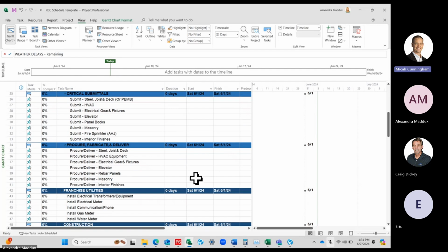That would be the measuring point. If the subcontracts are set up based on duration, that's what you would compare their durations to. And for the owner, that's what you would compare to for, okay, is this critical? Is this becoming critical? And what's your finish date that you have to meet overall? Your finish date can change if you get a change order, but that would just be your initial perfect world plan where nothing's delayed, everything's on time, and everything goes as planned.